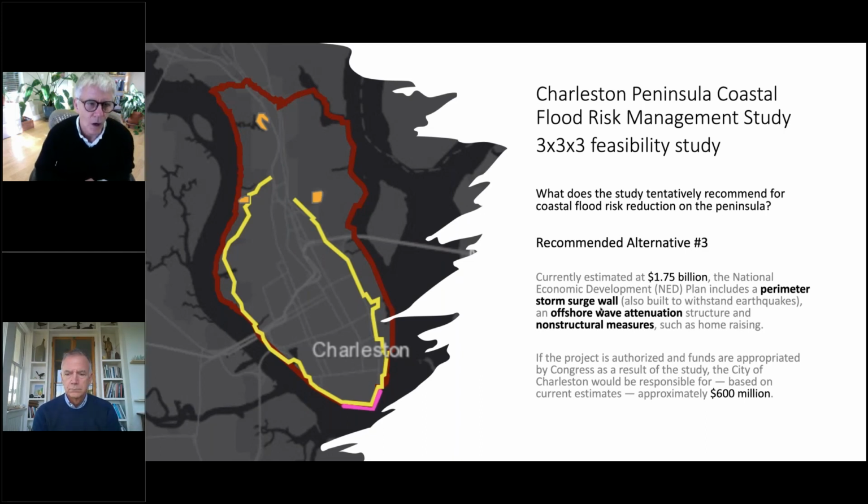Those are outlined in orange in this study area here, and they consist mostly of raising homes out of the 100-year flood, and also some flood proofing associated with that. This recommended alternative right now is estimated to cost $1.75 billion. Charleston, being the local sponsor, would have to come up with a cost share of approximately $600 million.